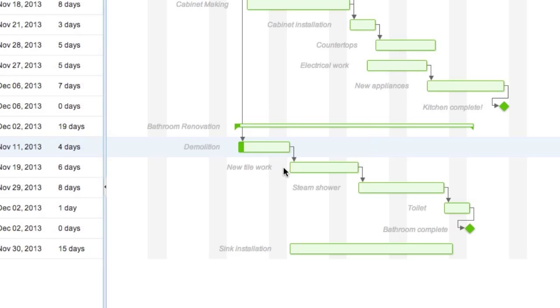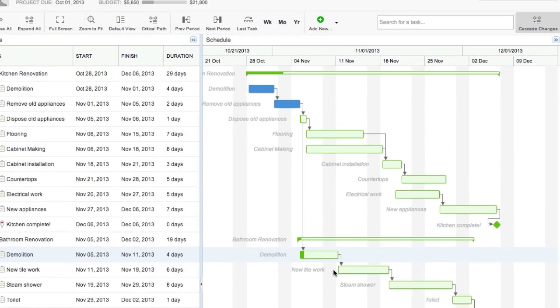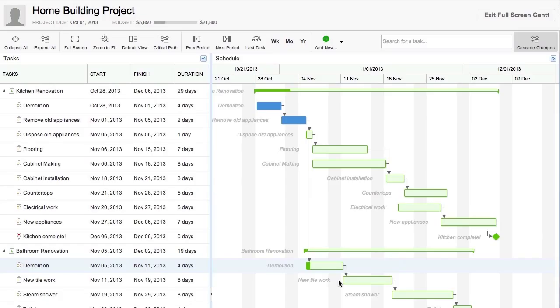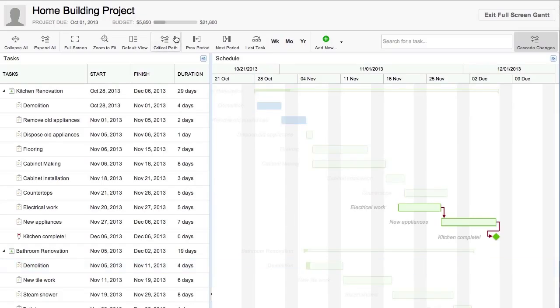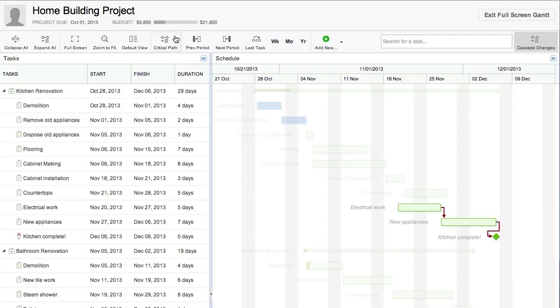To get even more out of Gantt charts, make sure to explore the options on the top bar such as the critical path button. Selecting this button highlights all the tasks that determine the end date of your project. Looks like we need to assign someone to install the new appliances ASAP.